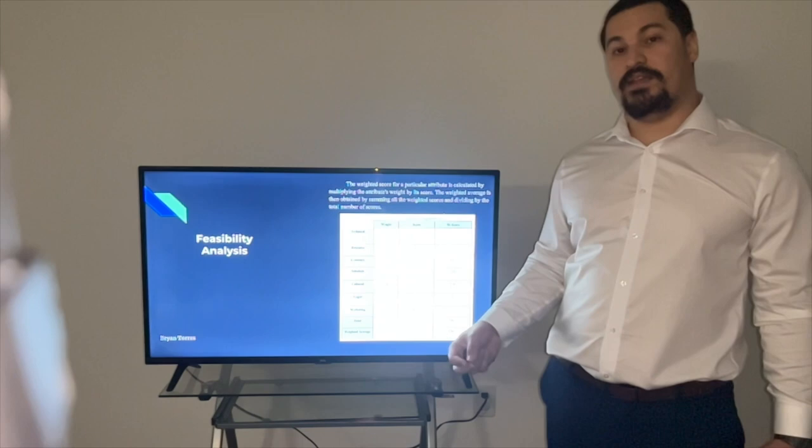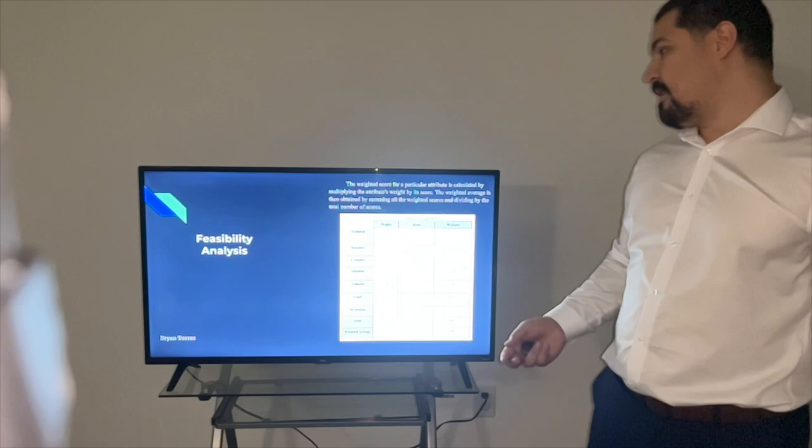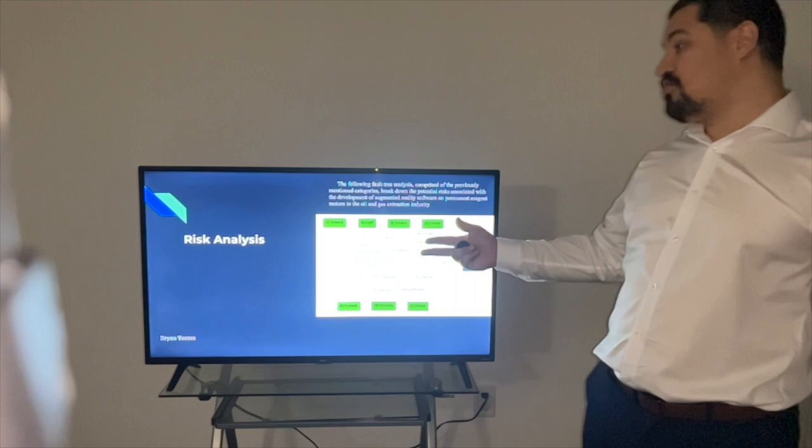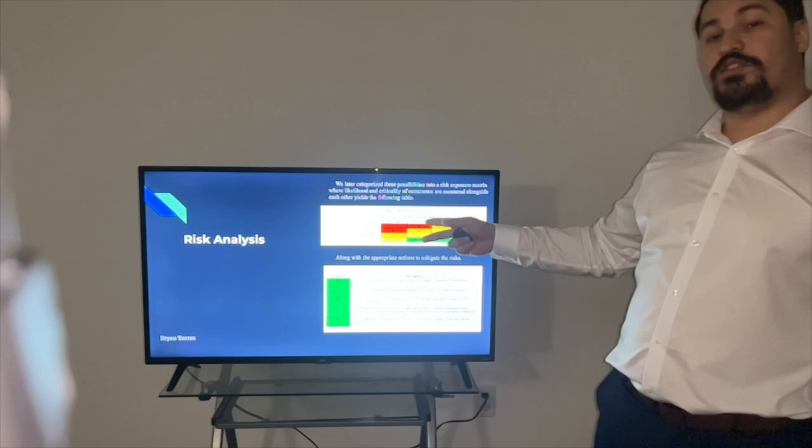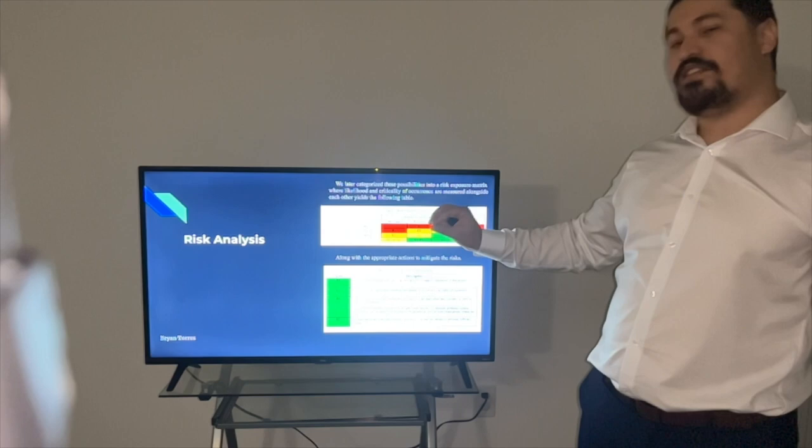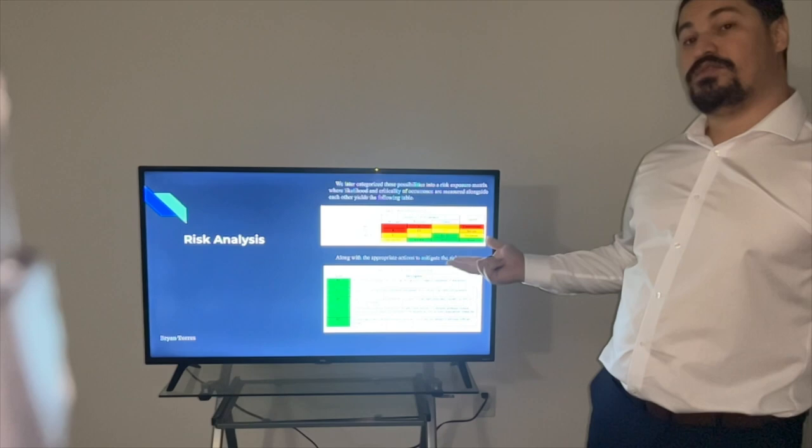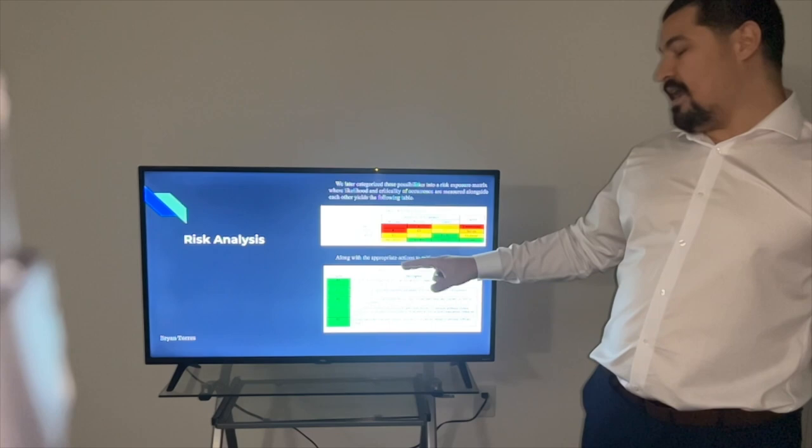Now for risk analysis, we showcase the fault tree and we list a couple of harmful events that we could foresee on each one of these attributes. We also presented a risk exposure matrix where we measure the likelihood of occurrence and classify by colors. We have the legend here, red being catastrophic and green being the lowest likelihood of occurrence. And we also present appropriate actions we could take to resolve these issues, how to mitigate these risks that we could foresee in our project.